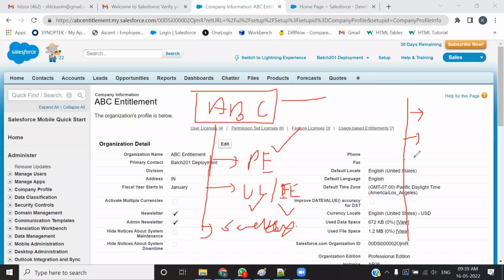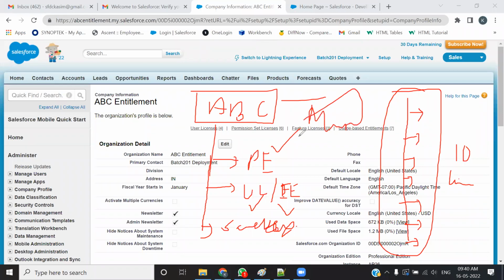If we are saying that there are 10 people who are going to be employed and work on this project, including the project manager and delivery manager, we certainly require one license per user. So if I say that 10 persons will work on your project, we certainly require 10 copies of Sandbox licenses. So this is how billing and everything goes. This is what we actually do as managers.